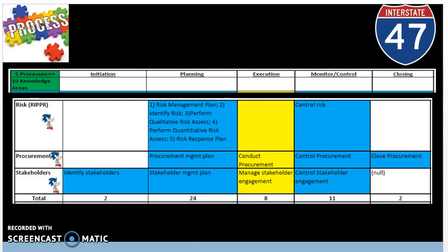So let's stop there. Basically what's going on is every time a change request is raised, it goes into the Perform Integrated Change Control process to be approved or rejected, and any rejected changes will be stored in the change log and need to be reworked again, and the stakeholders have to decide if they want to raise change requests to get those fixed. And at the very end, the goal is to have no issues left, and the change log should be empty as well as the issue log towards the end of the project.